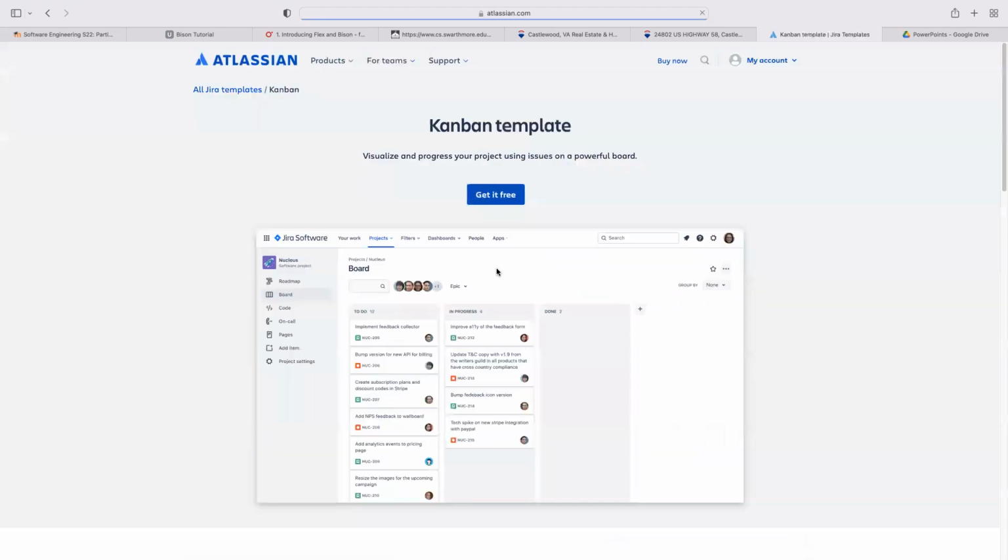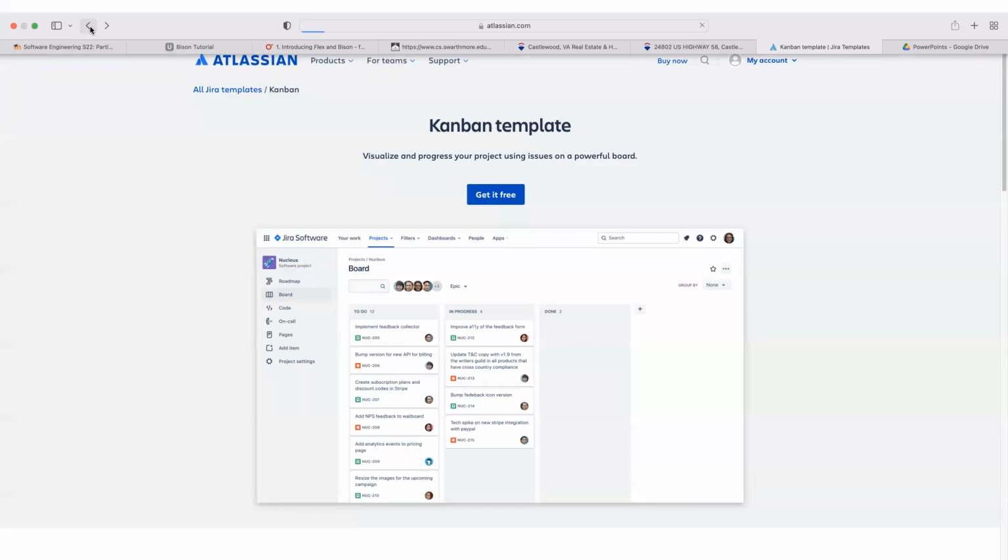I show a picture there of what people often do physically. They'll have little square sticky notes they put on a board. On each sticky note you put a task, which should take about 6 to 8 hours from start to finish. You can then move them through the different stages. So you have the backlog, and then they're in progress, or maybe they're waiting on somebody else, and then finally they're done. And these videos do a good job of explaining that.